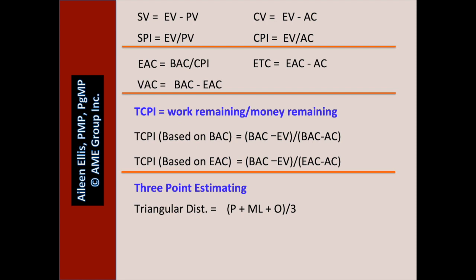If I asked you how to average three numbers, I'm sure you would know how to do it, so most likely you won't even bother data dumping this equation. Related to it, though, is PERT, sometimes called the beta distribution. This is a weighted distribution: pessimistic plus 4 times most likely plus optimistic, divided by 6.